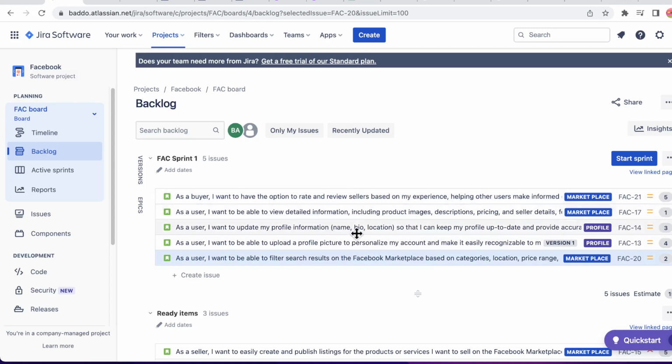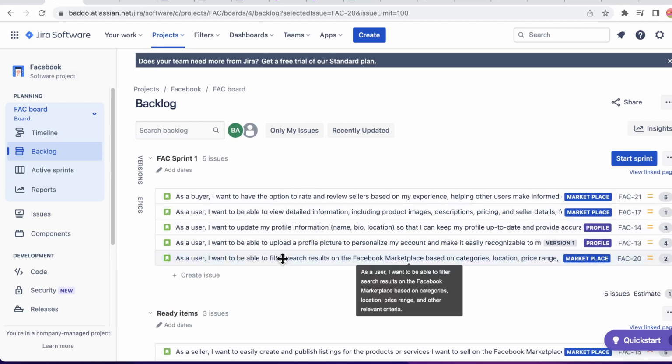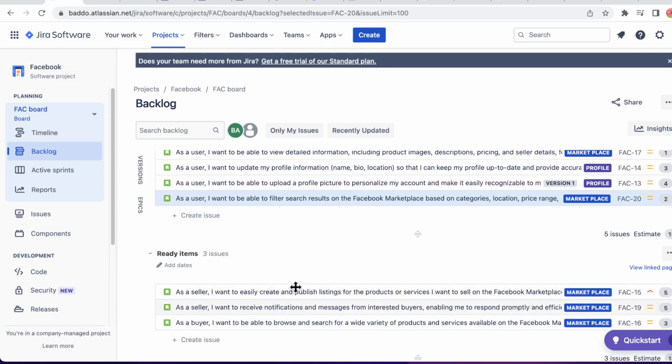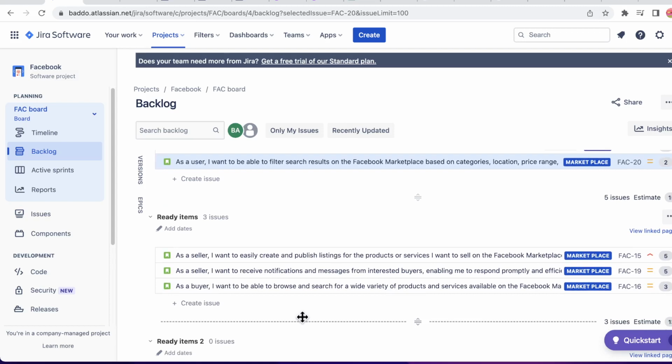At best, you do your refinement a week earlier, right? Some people can be having a sprint-ready backlog of items that can even last through 2 sprints. You don't want to do more than 2.